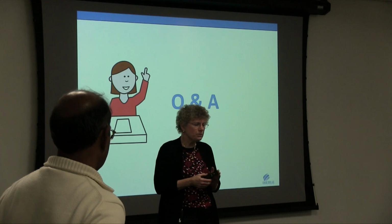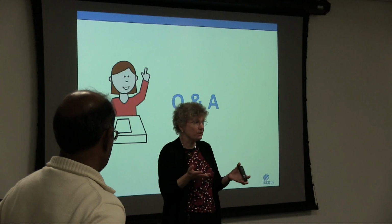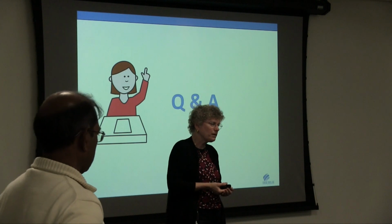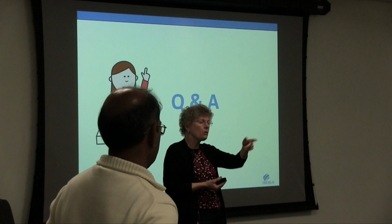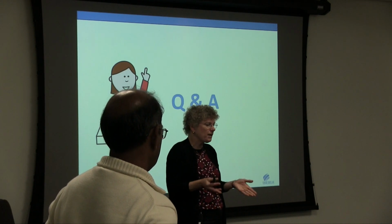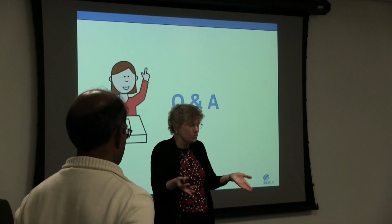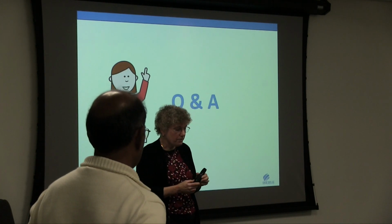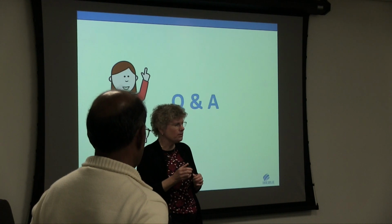So I have 2 tools that I think are really useful in finding a balance when you don't need 100% totally awesome quality, is the non-functional requirements, defining what your quality targets are, how much reliability is acceptable. The statistical approach we were seeing in one of the papers yesterday was really talking about it's okay not to have 100% reliability, so how do we define reliability? And he was using statistics to help specify. And another good way to think about that is a defect severity rubric.